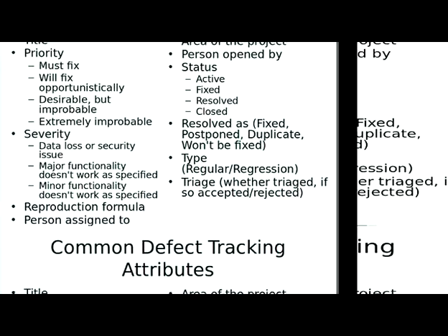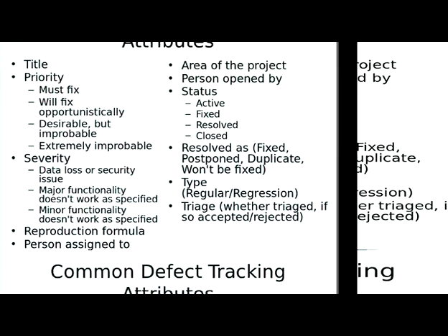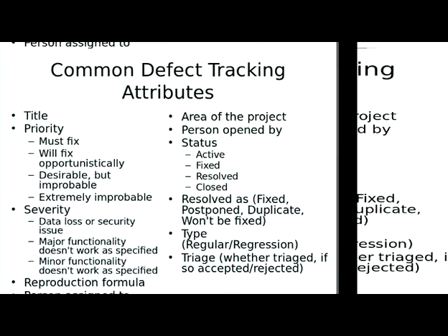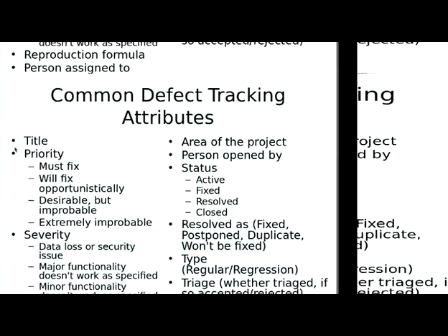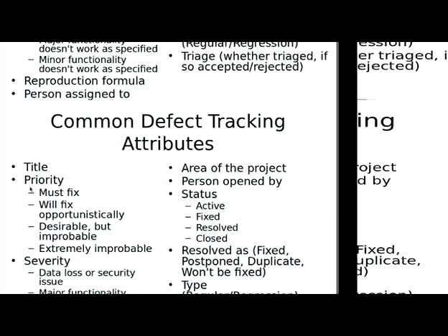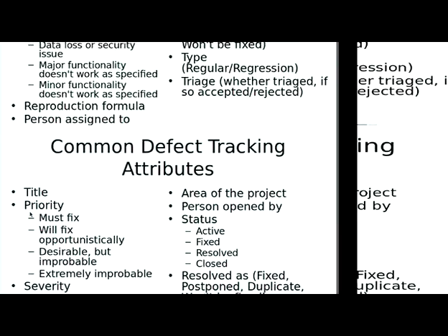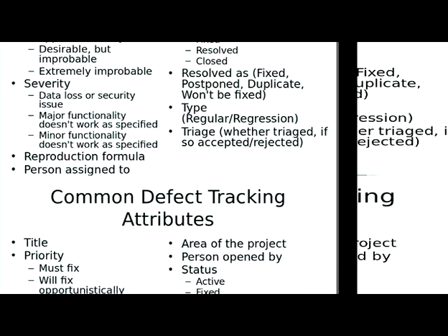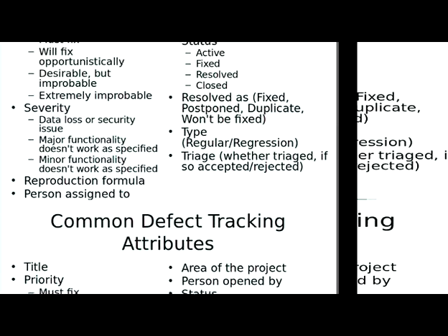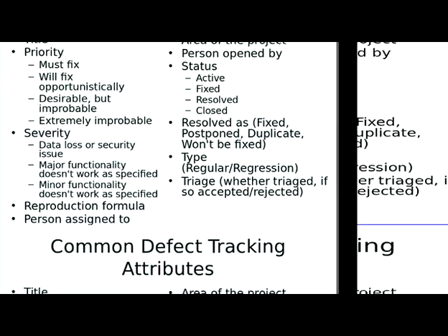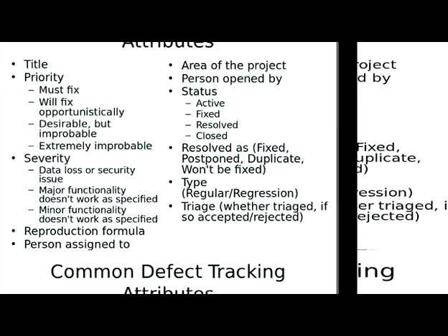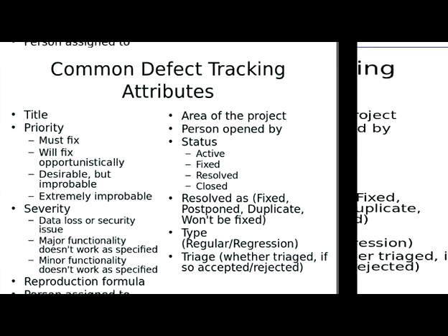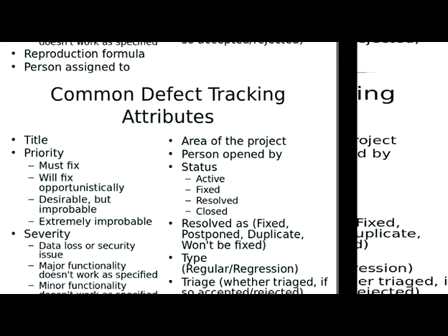And we had this notion of risk exposure, remember that? Where you have severity times probability of occurrence, the badness, or maybe that's rated on a scale of 1 to 10 or what have you, 0 to 10. Priority here fundamentally boils down to, how important is this thing to fix? Must fix, if possible, desirable, entirely probable. That's one set of distinctions. I don't actually like these ones that much, but it gives some measure of, okay, what level of overall need is there to fix this.